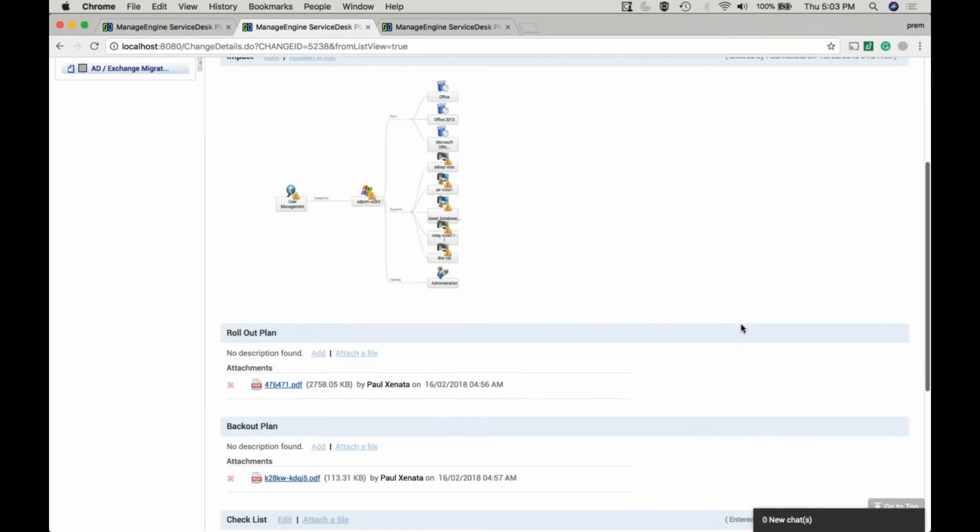All right, that is a very interesting question. How do you say that 6 hours is enough for this change activity, or 4 hours is enough? How do you do that? It is a calculation you have to do based on the assets involved, the number of assets, the complexity of the change, and how many human resources you have to implement a huge change that involves 25 assets. Based on the man-hour calculation, you have to arrive at an estimate for the downtime.